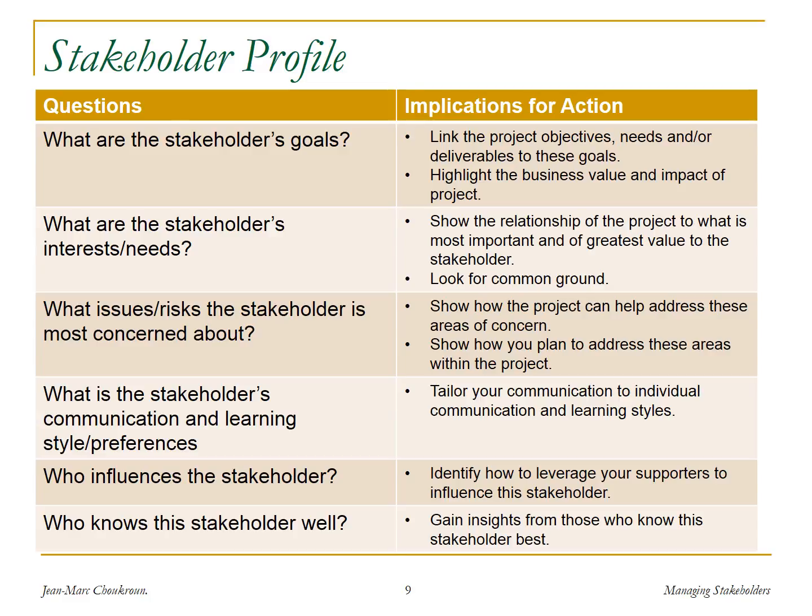What are the risks and other kinds of issues that the stakeholder is most concerned about? Well, maybe your project can address some of those, or you can show how your project plan is trying to mitigate those risks. You also want to understand what their communication and learning style preferences are, so that you can tailor your communication to their style, remembering what we discussed about the decision-making types a week ago, or last week, or 2 weeks ago.